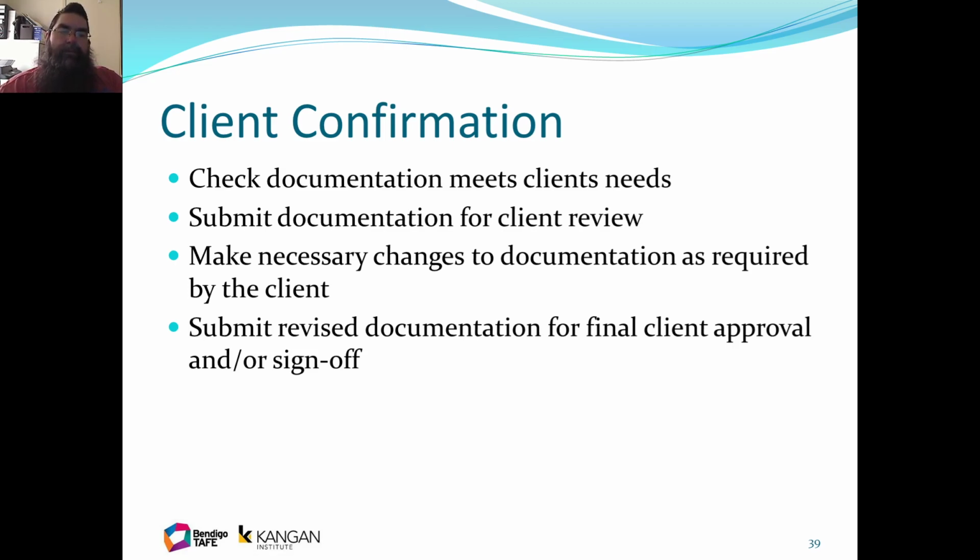So client confirmation is a multi-stage process where we check the documentation and make sure it's meeting the client's needs. We submit that documentation in a draft form to the client for review. They'll respond with any changes that they want, and then you submit the final documentation for approval to get the project kicked off.